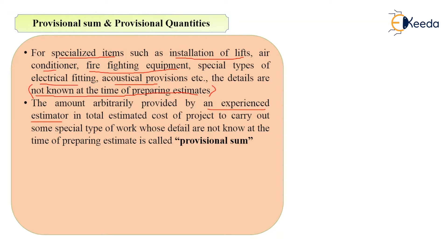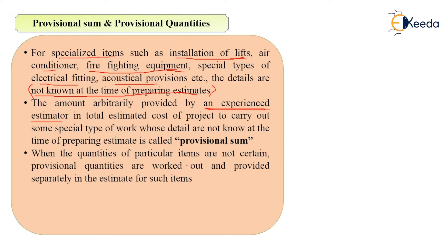An experienced estimator is specifically required here because at the time of calculating estimate quantities, any estimator can calculate various quantities by multiplying number, length, and width. But since this is a lump sum amount not known at the time of preparing estimates, only an experienced estimator will know that special items like lifts and air conditioners need to be installed and what amount should be added as Provisional Sum.